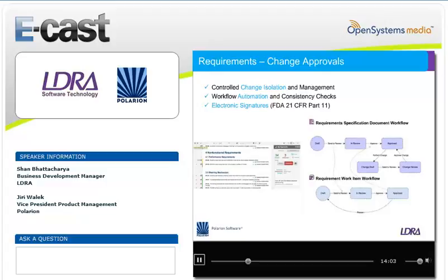Auditability is definitely important, so you understand who, what, and when for every single change. But a change has to be also properly isolated and managed. It means that you need to track the why, so why the change actually happens. This is typically documented as a change request. And you need to link all the changed requirements to these change requests. You have to, of course, ensure that every single change is processed like that.